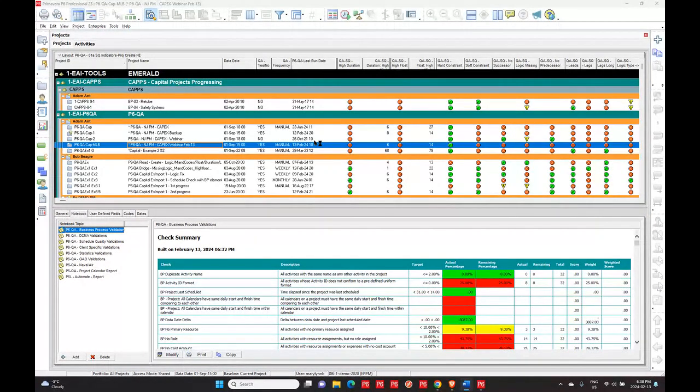So the other one, just from kind of a real world reference, another one that I find is just absolutely nasty. Number one, if you've got a bunch of activities that end up with exactly the same name on them, well, you can't blame people for getting the wrong activity to do their updates, because they're likely not going to be able to tell the difference very well.